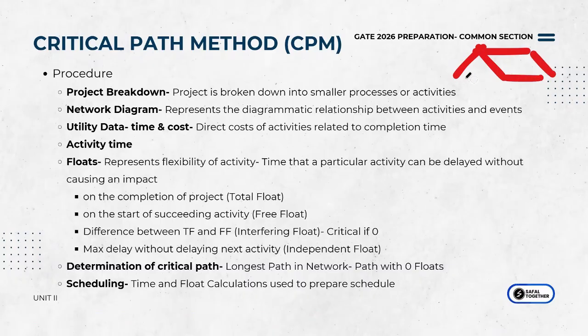Your particular house will have different activities to be done, right? So you have the foundation or anything that's below the soil. You have the superstructure. Okay, and you have roofing. You have interiors, all of that. So you break it down into all of these activities. So that's your project breakdown. Then you create a network diagram.